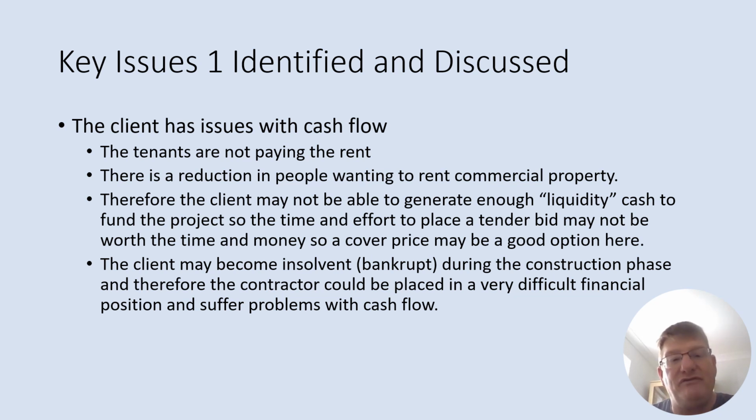All right. Point 4, which is the worst case scenario for any contractor, is the client might go bankrupt during the construction phase. And therefore, you, as the contractor, the people in High Holborn, are put in a precarious financial position. You could suffer great consequences in terms of your own cash flow and liquidity, and hence you could actually go into liquidation as well, because these things tend to have a knock-on effect.